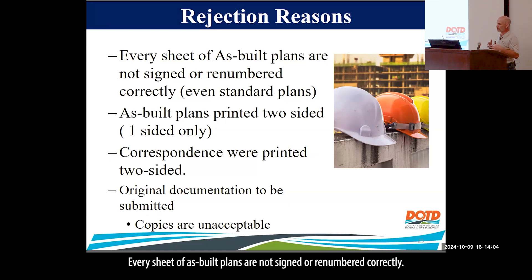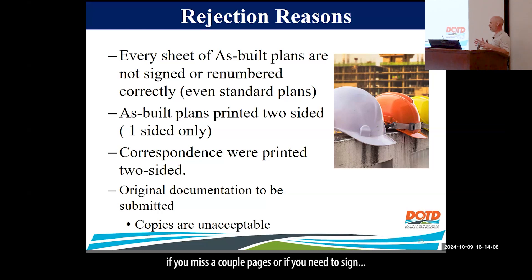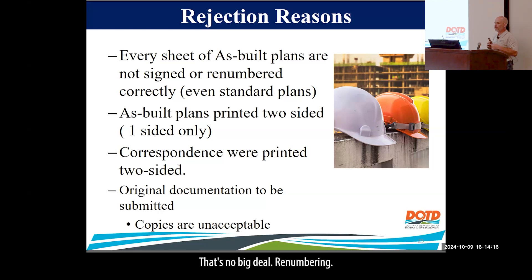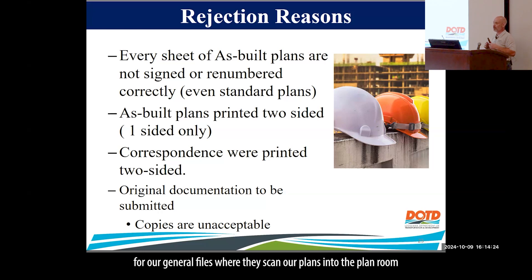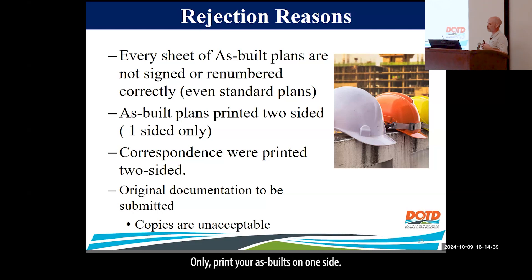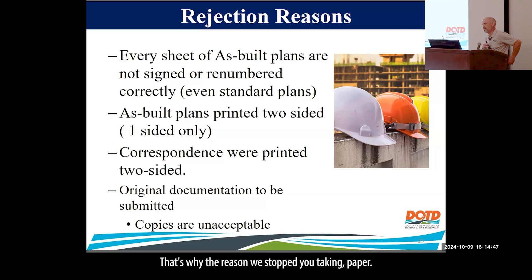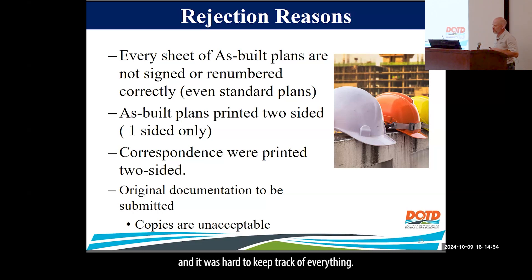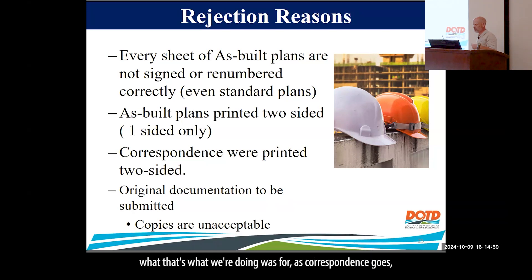Every sheet of the as-built plans must be signed or renumbered correctly. We'll let you sign it there if you missed a couple of pages. Renumbering is actually a policy for our general files where they scan plans into the plan room. As-builts printed on two sides will be rejected — they scan them in, so please only print your as-builts on one side. Correspondence printed on two sides is also a reason we stopped taking paper correspondence and moved to thumb drives.